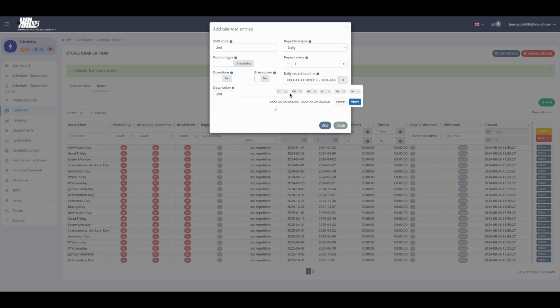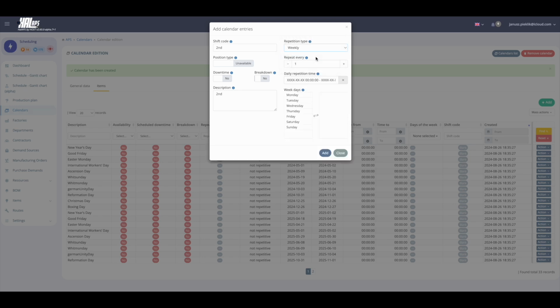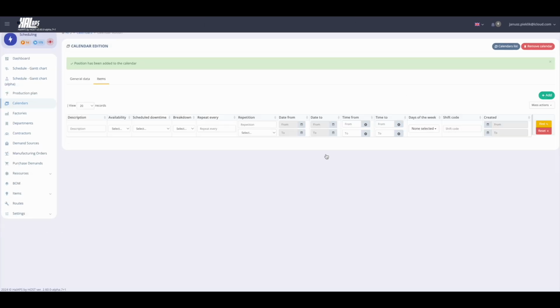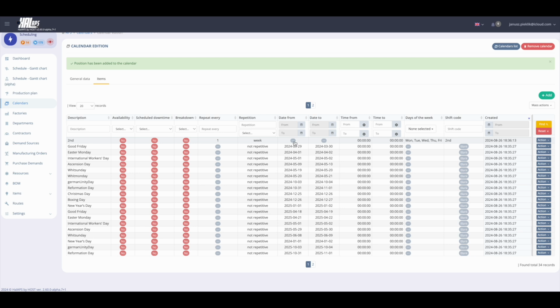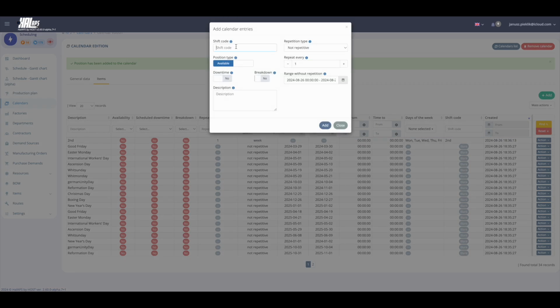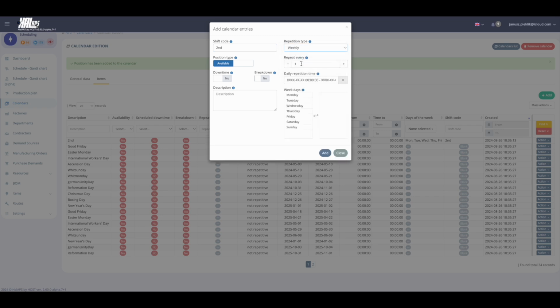The calendar defined in this way should be connected to a single resource, several resources, a group of resources, a department, a factory. The calendar can be connected to a supplier, a subcontractor, or any participant in the supply chain. The calendar is the place where we define planned downtimes related to machine repairs, tool regeneration, or employee holidays. It is a very flexible mechanism, literally 3 clicks are enough.